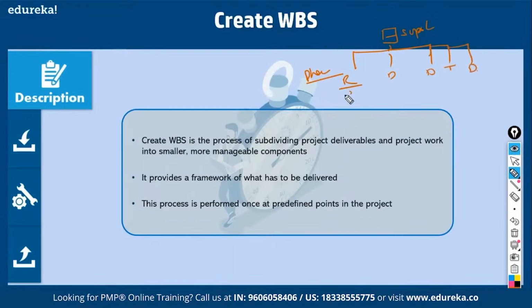Then from these phases, you define what the major deliverables are. For example, requirement documentation is a major deliverable. Requirement documentation for what? Well, Reuters interface, then Bloomberg interface, then interest rate interface, all the requirement documents. So you come to the lowermost level, which is called a work package or deliverable. This is a process of decomposing work into the lowermost part, called a deliverable.